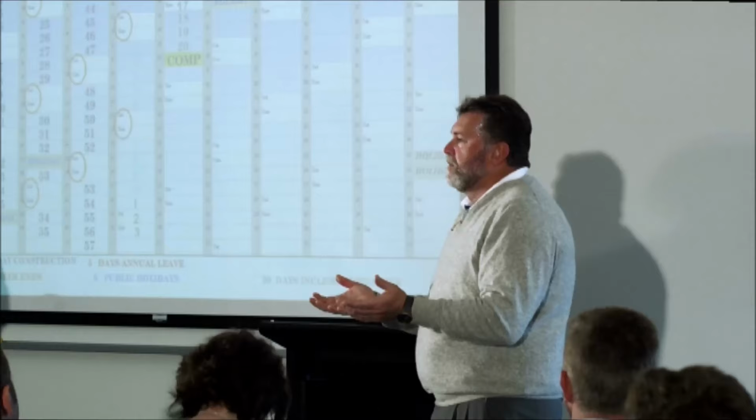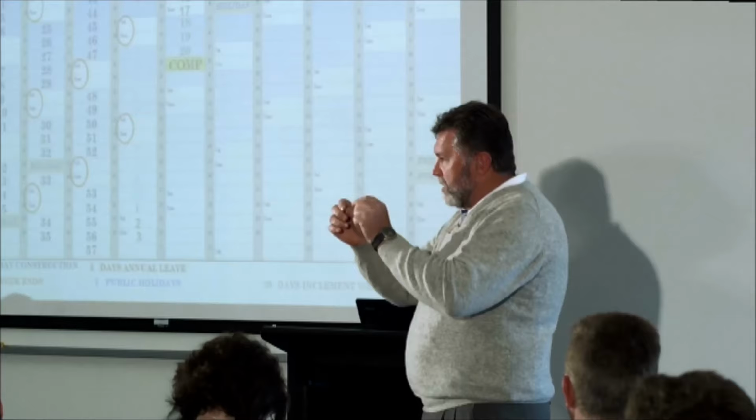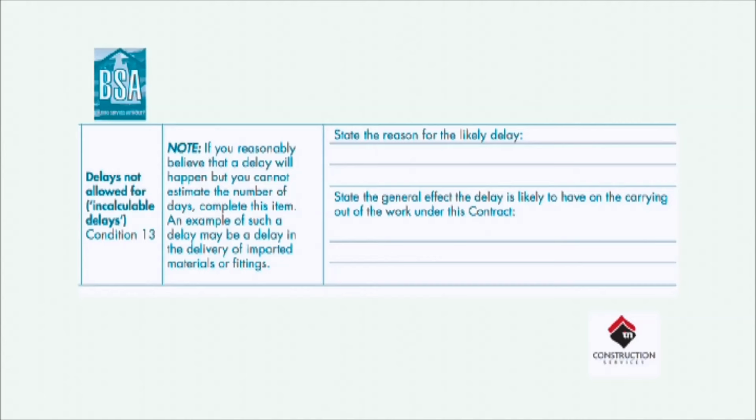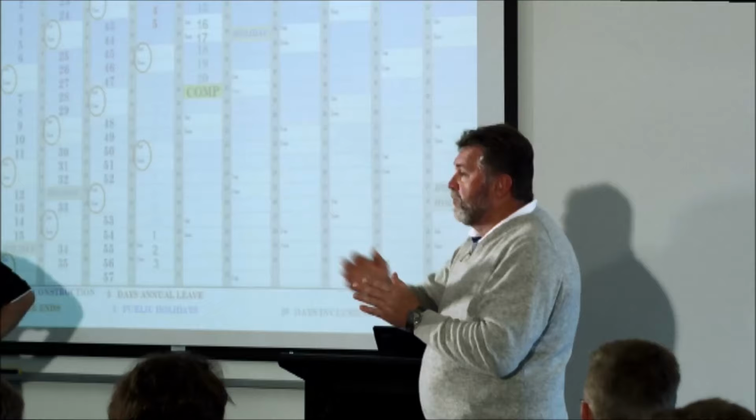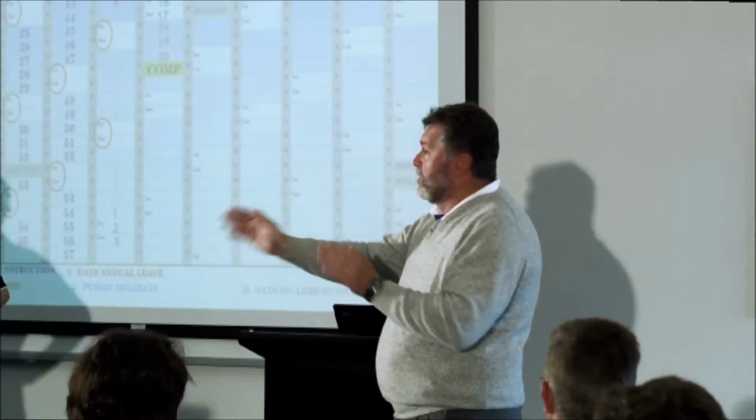But that's what I'm saying. If you have a look at the part in the contract where it says incalculable delays, it actually says state a reason why. It doesn't say there that you have to put days. You don't know. All it's saying is, what is the effect that it will have? The effect is it will extend the date of practical completion. That's all your answer is.